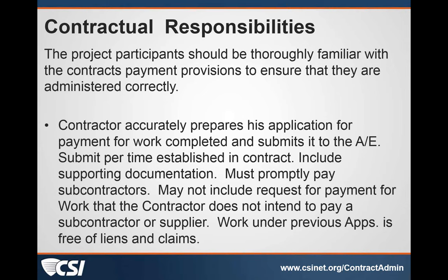He also, and this is a requirement that is not only in the AIA general conditions, it's also in several different state statutes, he also must pay his subcontractors promptly. He may not include requests for payments for work that he does not intend to pay a subcontractor or a supplier for, and by submitting his pay app, he is certifying that the work that was paid under previous pay apps is free of liens and claims.